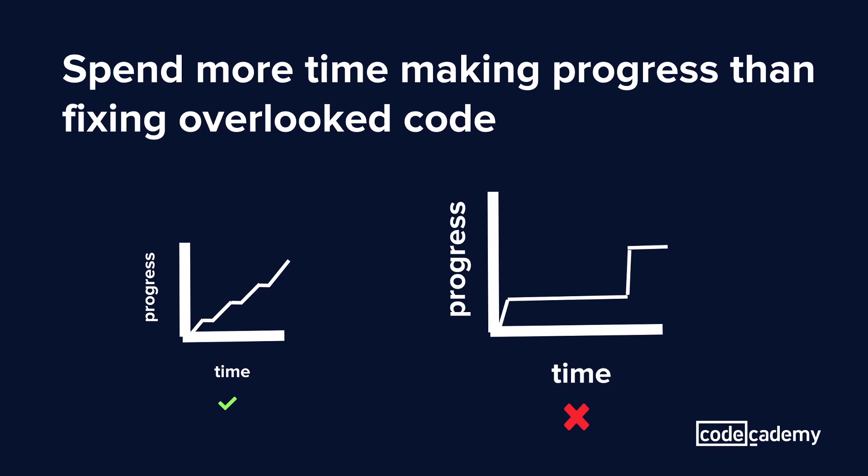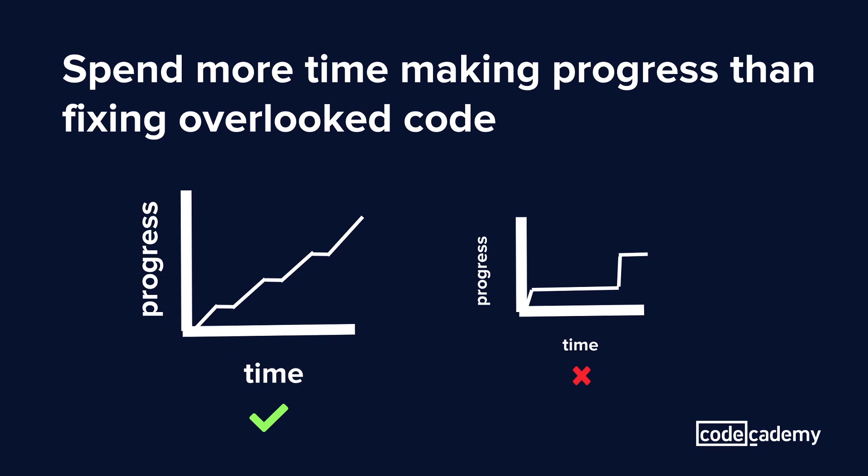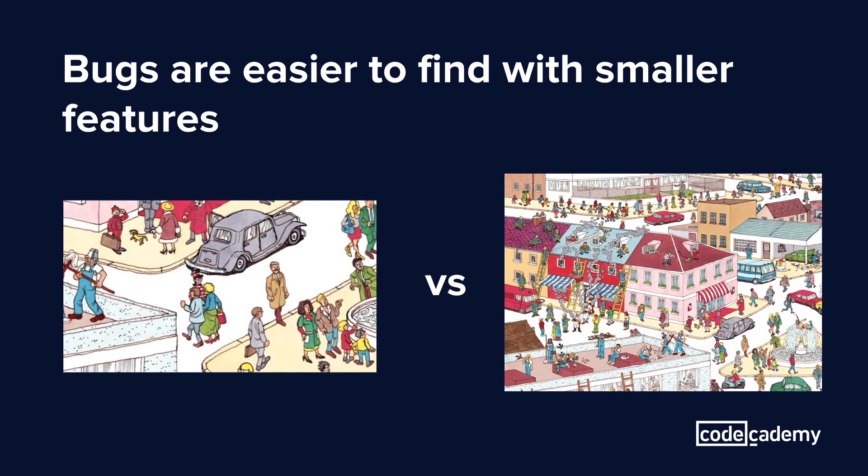On the right, you can see that when you push out really large features in one go, there's a lot of time being spent with little progress being made. This is because you spend more time going through more code to debug and test than if you were to make smaller changes. So when you limit the size and quantity of the features going out, like in the graph on the left, bugs are a lot easier to catch. You can isolate the issue more easily when there's less code to go through. It's like when you're playing Where's Waldo, with Waldo being your bug and the rest of the picture being your code. It's a lot easier to play when the picture is smaller.